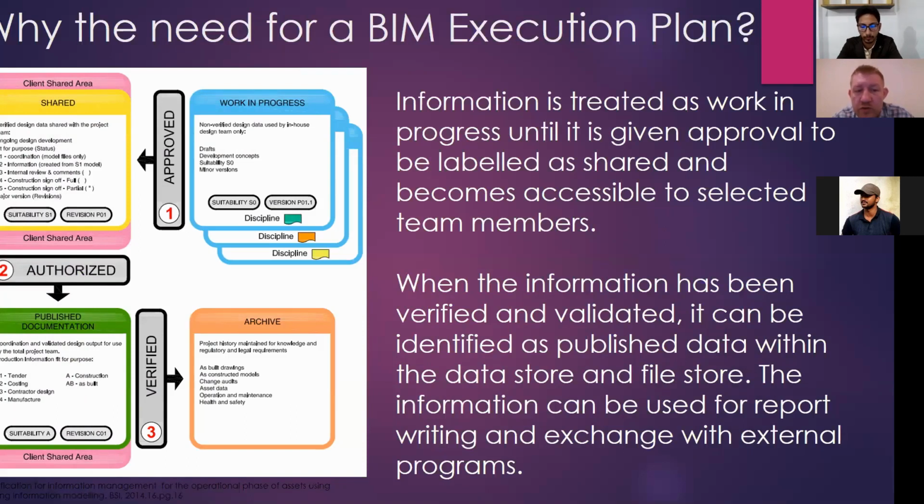So work in progress, you would have many disciplines, but you still need to have a leader that will be your coordinator between the different disciplines. So the client shared area, that will be where the client will have an actual person to be in charge of the execution plan. So he will be kind of filtering the approval process between the work in progress and shared information. And the same thing will happen from the shared information to the published documentation, and then from the published documentation to the archive. So these are the steps.